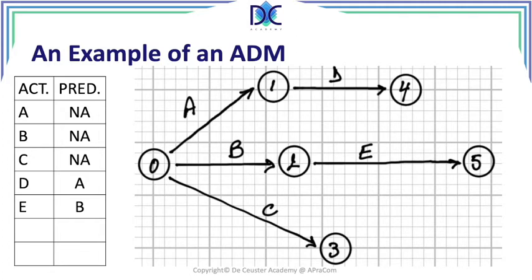And now we are going to add activity G. Activity G has basically two predecessors, B and D, and I start with G from the node 4, so we start from D. The element is that we also have a second predecessor B, but following the rules of the activity on the arrow method or the arrow diagramming method, we cannot draw an arrow between 2 and 5, so we have to draw a dummy between 2 and 4.